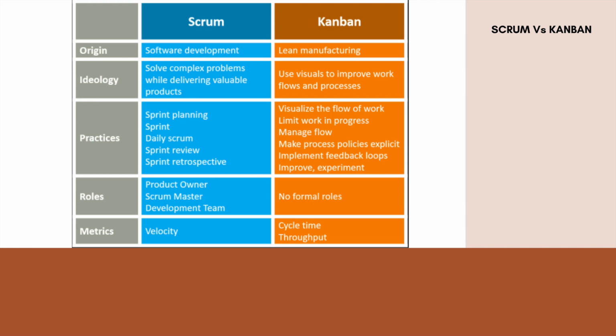So it disrupts the Scrum activity and the timelines, and Scrum may not be feasible for DevOps, SRE, and other support teams. Whereas Kanban may be more suitable to those kinds of projects where you don't have any surety, and anything can come ad hoc for production fixes, or other maintenance or other BAU activities. BAU is business as usual. To maintain the business, there are certain things which are needed by the operation team. So those kinds of things can come here.